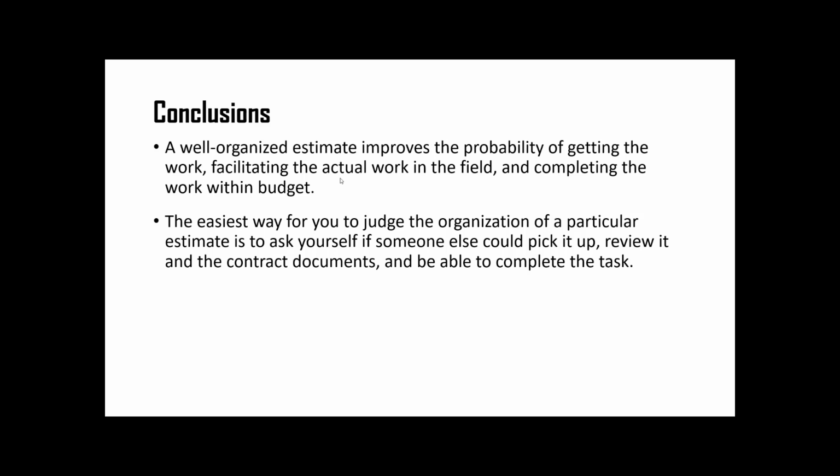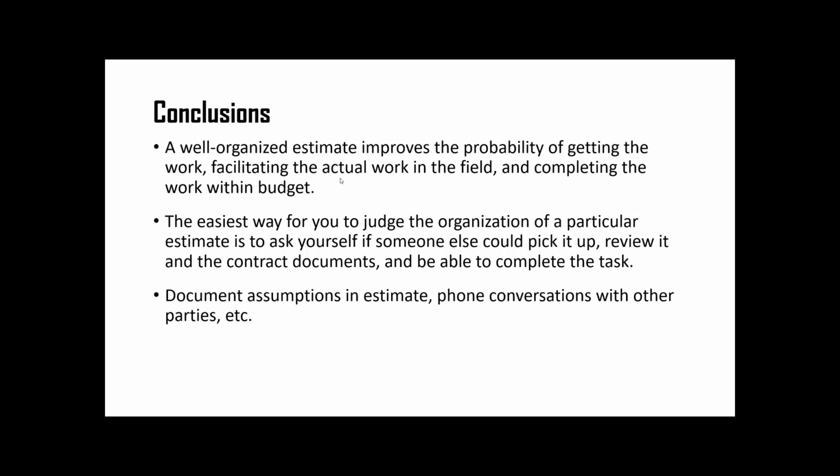And while you are making the estimate, it is important to make a note of everything that supports that estimate. For example, you should document what assumptions you made in the estimate. If you have any phone conversations with material suppliers, engineers, or architects, you have to make a summary of what conversation happened. Estimator notes give good insights for the project manager and the crew who are actually working on the project.